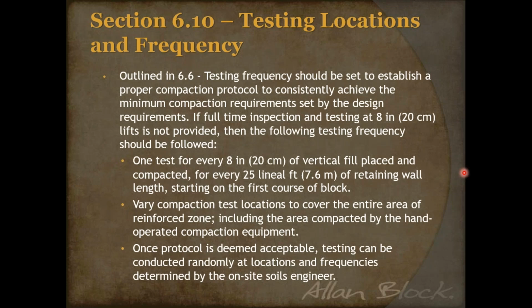But obviously, if there's a scope that works better, or there's a contractor where there's acceptance, maybe you do less, maybe you have to do a little bit more. Again, it gets back to regional, it gets back to the scope of work. But what we're trying to do in best practices is just make sure it's being defined. And if it's defined as part of the bid package, then everybody is doing it, it's part of the bid, and there's no miscommunication. So again, it just helps raise the bar in our industry.